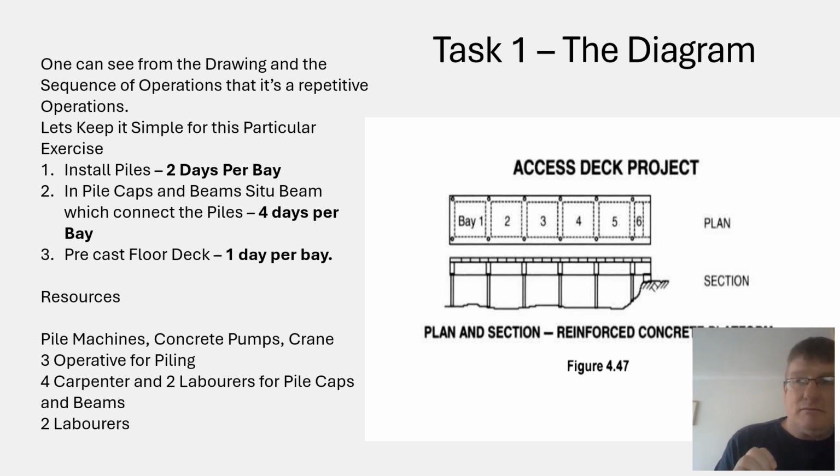But obviously, what you've got to remember is that the site is quite constrained, in a geographical and physical sense. You're talking about having a large pile machine, a rig, which are really large. You're talking about having a crane. You're talking about having concrete pumps with concrete trucks and all this labor. So we have to set it up so that they're working together rather than against each other and getting in each other's way. So the sequencing, in many respects, is quite logical.